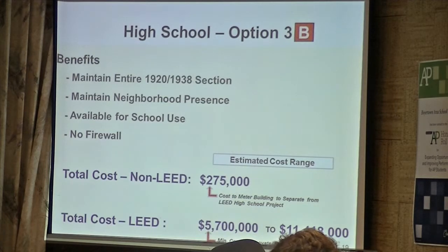Okay, I'm not trying to put a lot of pressure on you to decide. Well, I think as part of the process, that kind of information needs to be put out there so that we know what kind of timelines we are under to prove most beneficial as far as cost. Based on that, we would need to know prior to October, and if we would need to design something, we would need to know even earlier than that. October of this year? Yes, that's when we're looking to go out to bid.